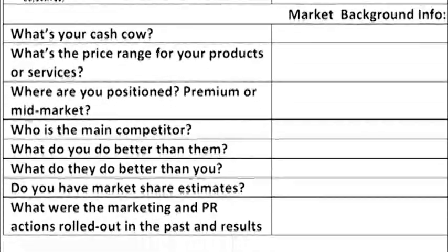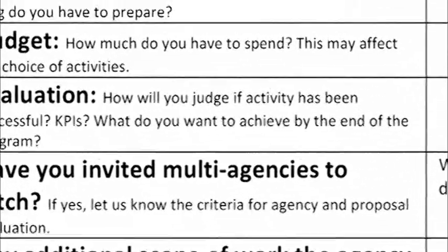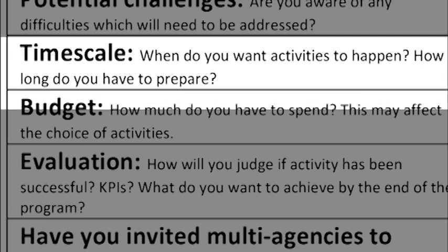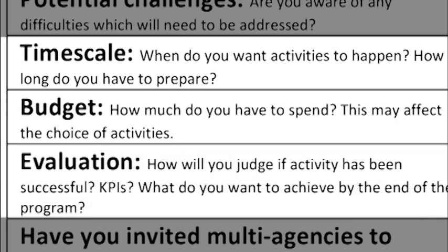Three of the most critical items for planning on the briefing sheet are: timescale — when do you want the campaign to take place and how long do we have to prepare; budget — how much do you want to spend, as this may affect the choices of activities; and evaluation — how will you judge if the activities have been successful, and what KPIs need to be achieved in the campaign.